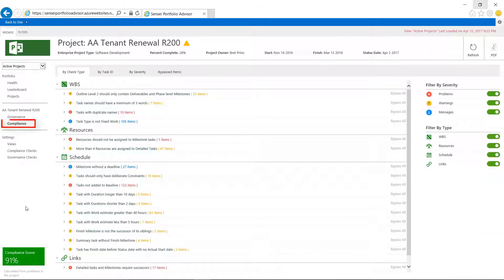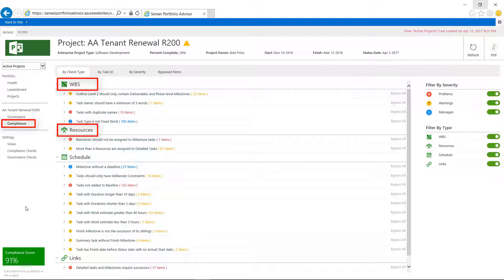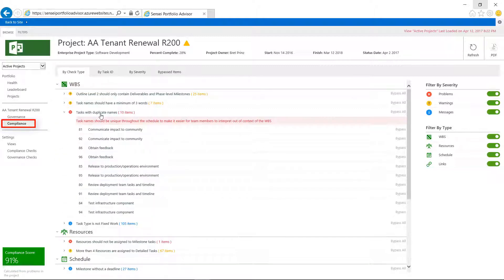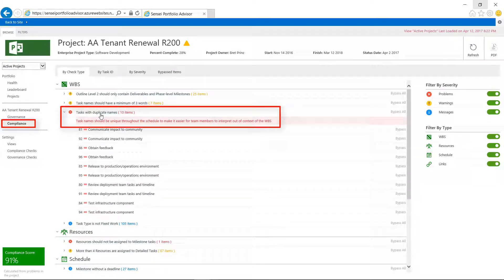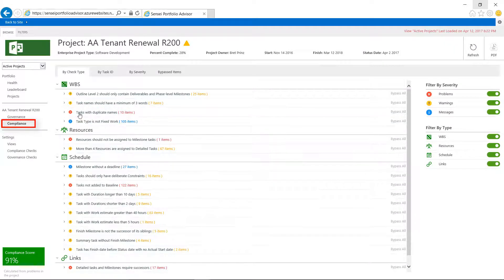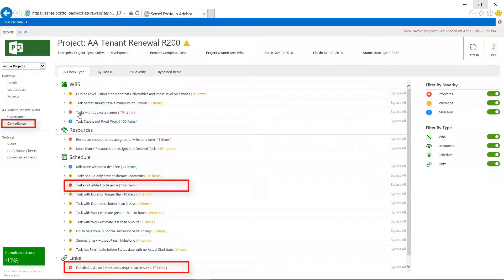The compliance pages go one level deeper and show detailed problems within the schedule. It highlights problems with my work breakdown structure, resources, schedule, and links. For example, we know that duplicate task names can cause confusion since team members can't easily tell the difference between tasks. Missing links and tasks not added to the baseline are just a few examples of other compliance violations.